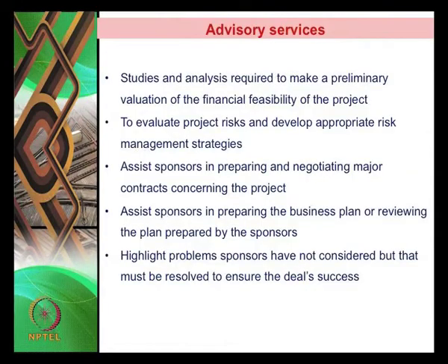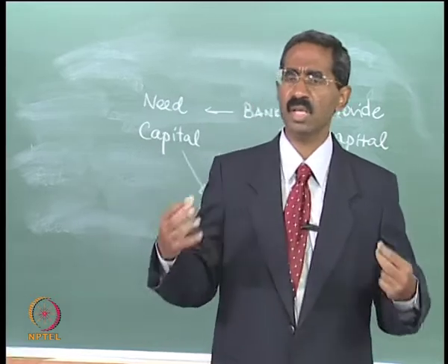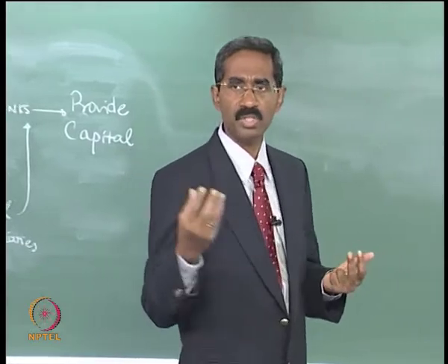Let us start with the advisory services. So what are advisory services? Advisory services include a whole range of services that are necessary to package the project, that are necessary to prepare the project for successful fundraising subsequently. Let us say for example, the first point is that advisory services would include studies and analysis that are needed to make the preliminary evaluation of the financial feasibility of the project. The first thing that needs to be told to the project sponsors is: is the project going to be financially feasible?